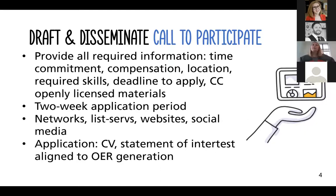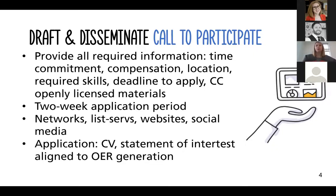Typically when we've run calls for OER creation, we've allowed a two-week application period — anywhere from a week and a half to two weeks seems reasonable. Sending this out to your networks, listservs, websites, and social media is very important for recruitment. You might also think about the application process requiring a CV and a statement of interest aligned to OER generation. Next up, selecting the subject matter experts. You put out this call and hopefully get a lot of interest — perhaps you only need eight to ten subject matter experts but have 20 applications. We developed a rubric tied to the requested application criteria to decide who to choose.